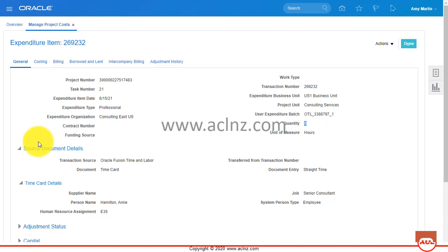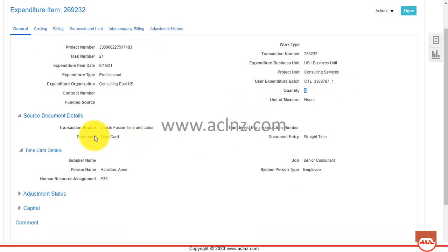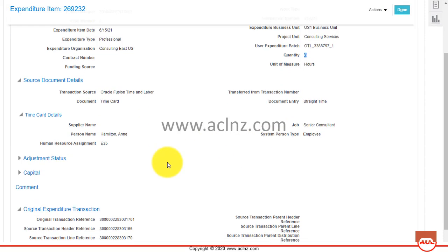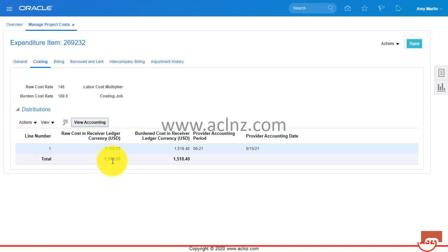Here are the details: the quantity charged is eight for a specific day, project number, task number, expenditure date, expenditure type is Professional, expenditure org is Consulting East US, and project unit is Consulting Services, expenditure business unit is US1. The source is Oracle Fusion Time and Labor, document is Time Card, document entry state is Time, and the person name is Hamilton, who submitted this timecard. The cost shown is the raw cost: rate is 146 multiplied by 8.